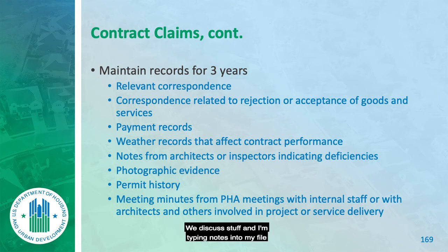We discuss stuff, and I'm typing notes into my file, and then I go back to the email, respond to them, and up in the subject line at the end of their thing I put in all caps, Gifford response, and then I recap the substance of the things, especially the things that I told them to do. Those have been invaluable for me later when they said, you never told me that. I go to the notes I sent you, and they go, oh, geez, you did tell me. Invaluable. And I've learned that over the years because if I'm not able to prove that I told somebody something, I may have to refund money because I can't prove that I was not at fault, that it was them at fault. That's important stuff.